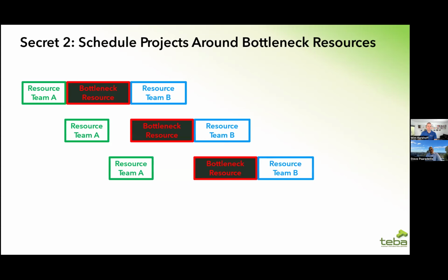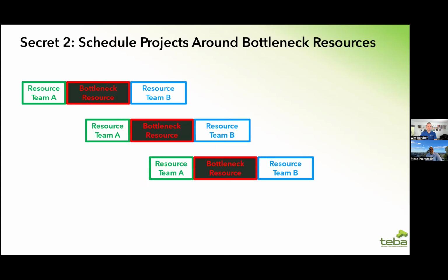So you might be thinking, well, that's fine. We'll schedule around the bottleneck resource. There's going to be a gap here and a gap there. I'm going to suggest that that gap interrupts project flow. And you're going to do something totally, again, counterintuitive. And please be sitting down, because some of you are going to have a little bit of a heart attack here. You're going to delay the start of those projects. As scary as that sounds.